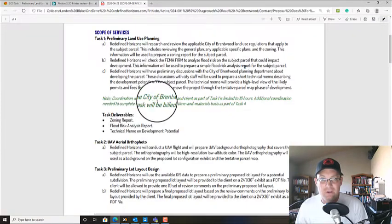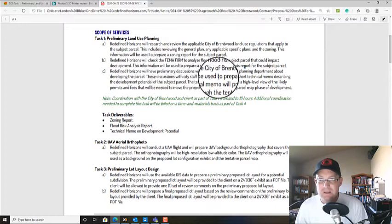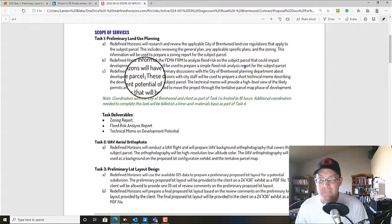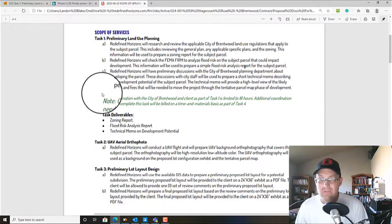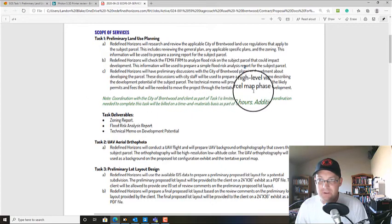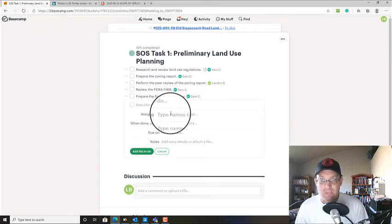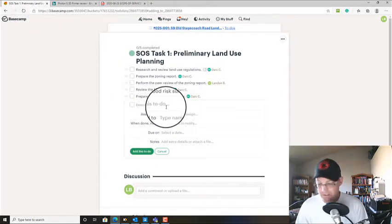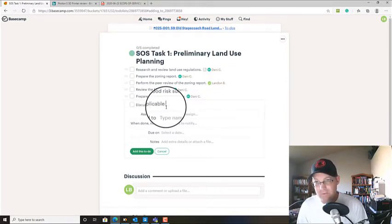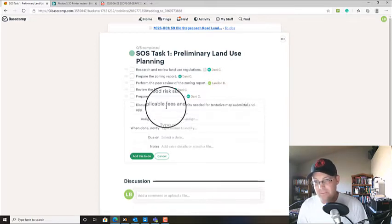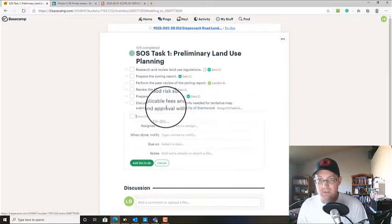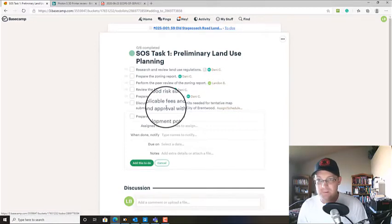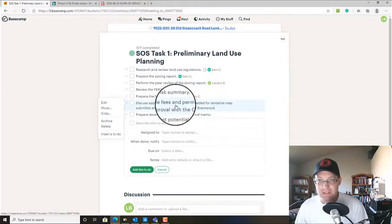So that should cover task 1A and 1B, then 1C. We're going to have some preliminary discussions about developing the parcel. And we're going to prepare a technical memo of the permits and fees that will be needed to move through the tentative parcel map phase. So we're going to say, discuss applicable fees and permits needed for tentative maps approval with the city of Brentwood. And then we're going to prepare development potential technical memo. And we're going to give both of these to Danny.